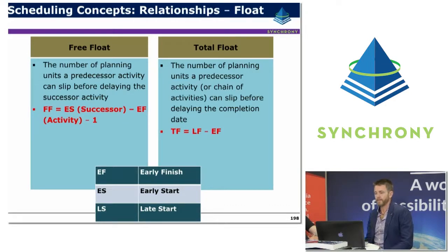So firstly, free float. Free float is basically the number of planning units or days, typically in a day-based schedule, that a predecessor activity can slip before it delays the next activity. It's typically calculated as the early start date of the successor less the early finish date of the activity less 1 day.